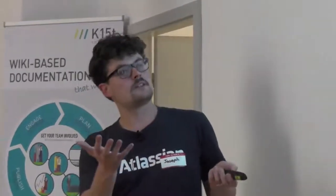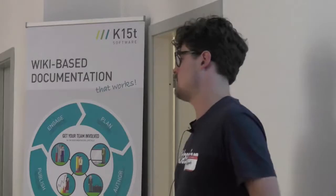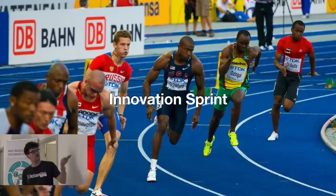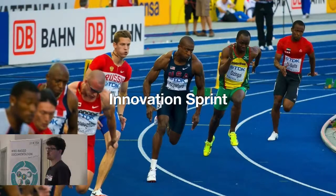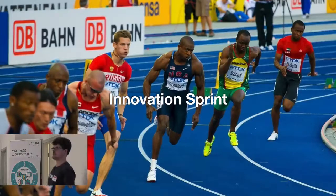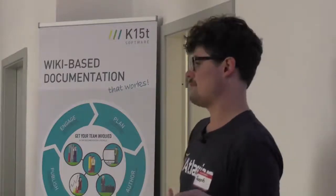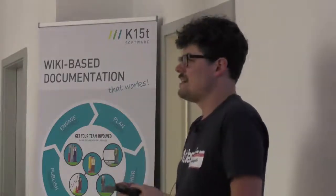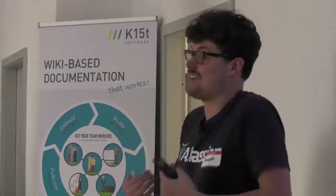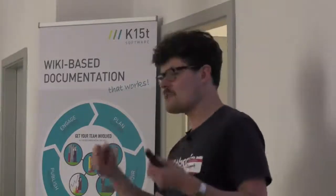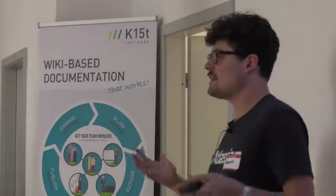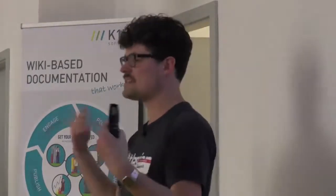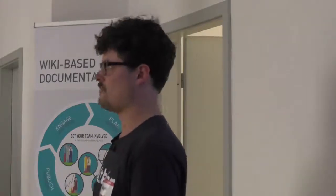So this was the state of affairs for a long time and actually recently, totally organically, this was not a top-down approach, teams started doing naturally a way to solve this problem. And that's with something called an innovation sprint. It's called a sprint because it forms part of your normal Agile team's workflow. So the premise of Agile is that you want constant velocity. Every sprint, we're going to try and achieve the same amount of work, which is great. But unfortunately, in reality, it never really works that way. There's always like a deadline or a crunch that you've got to work towards. At Atlassian, it's Summit. Whenever Summit comes up, every team is super busy trying to get everything ready so that we can show it off. So Summit is like a huge deadline where everyone's really pushing over 100% to get there. And after that, we really need to let everyone recharge. People need to let it out for a bit, just kind of have some slack time.